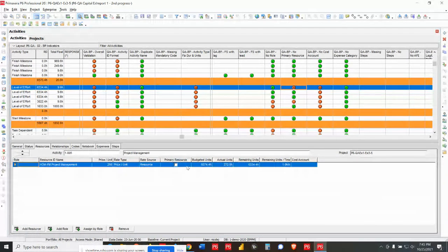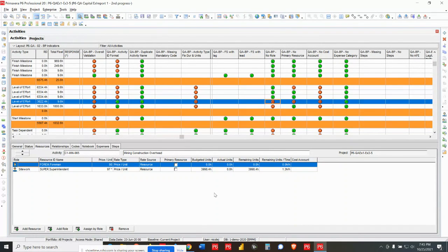So the primary resource is unchecked. And if you're using the updating through team member, and that's one of your approaches for the updating, that's an important piece. The update won't be on anyone's, in anyone's app. Okay, so that's an important one. If we're using role-based metrics and role-based resource analysis, and you've missed roles in here, okay, you want to be able to find that, okay?